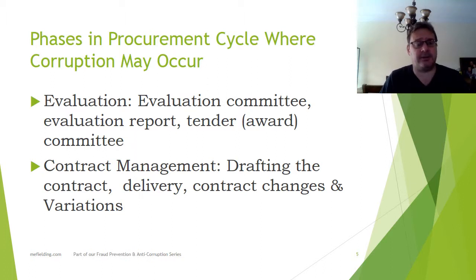Depending on your type of procurement, it may be that we just take all of the people who meet the technical requirement, and then we simply take the lowest. So if you want generic items, balls of cotton wool, which are being delivered to UNICEF, this is the technical requirement of the cotton wool, that it can absorb this much blood or liquid. Okay, now here's the cheapest. If you're going for something like a bridge or a consulting agreement, then you're looking for value for money. So it's not necessarily that the cheapest guy will be the best. So then you need to include your cost in it.